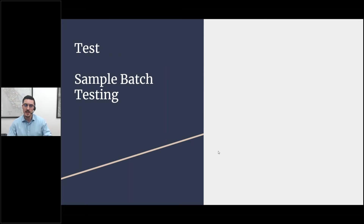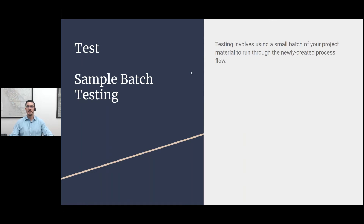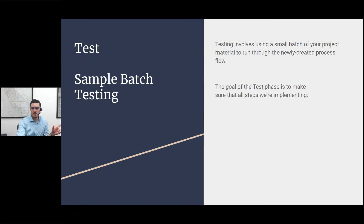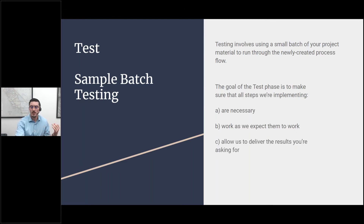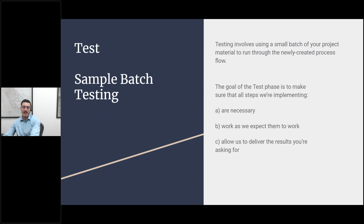Once the process flow is created, the next phase is the test phase — sample batch testing. What we're doing during the test is taking a small portion of your overall project and running it through that newly created process flow to see what happens. The goal is to make sure all the steps we're implementing are necessary, work as expected, and allow us to deliver the results you're asking for. We're actually using the real process flow — just with a small portion of material.